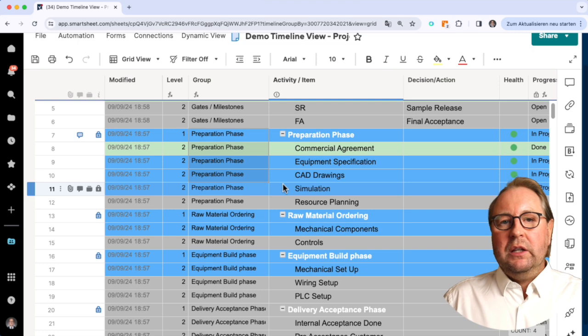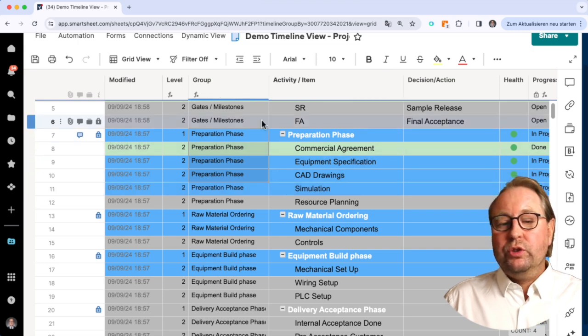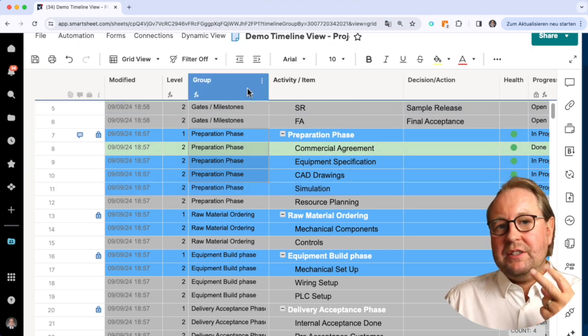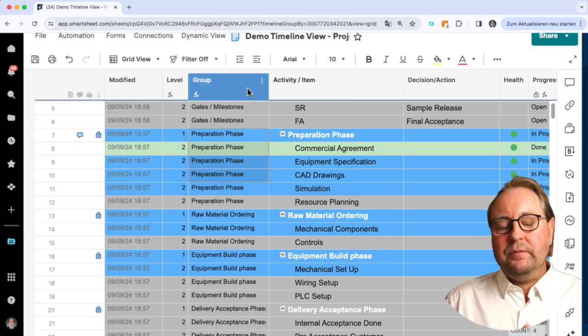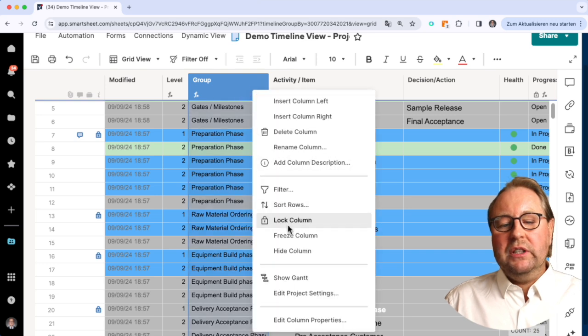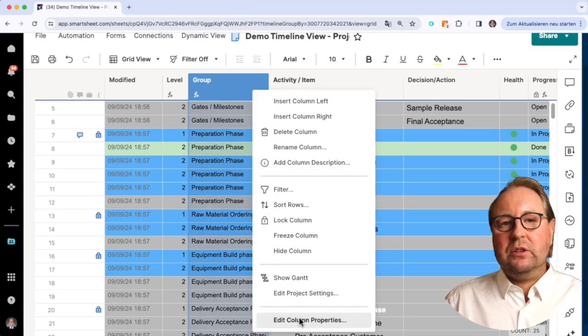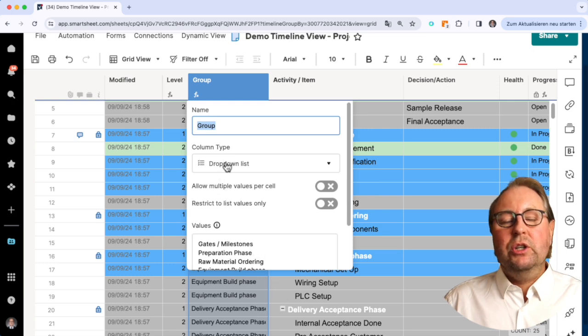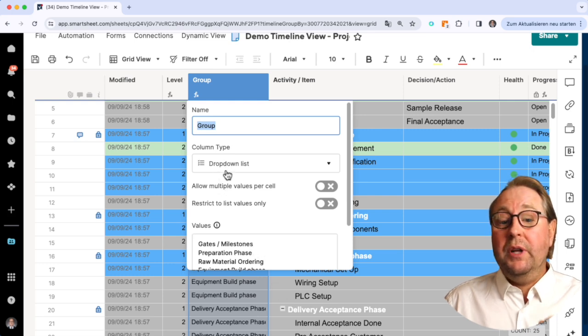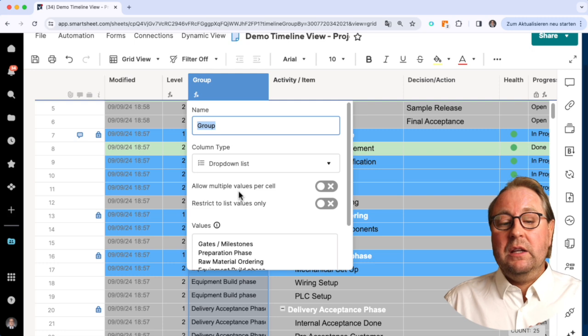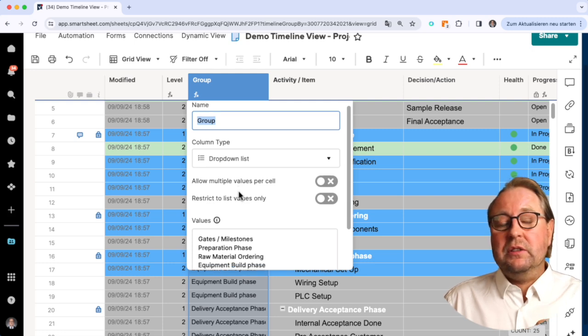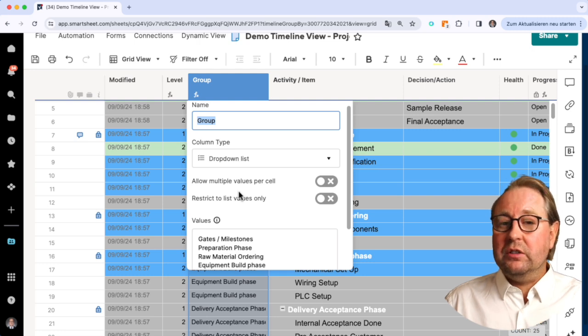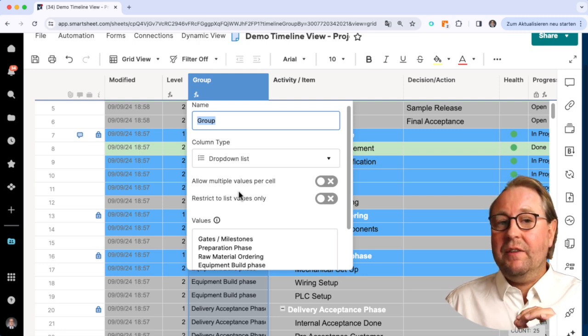In order to do so, we need a second step. We need here to change the column properties to a dropdown list. Just a dropdown list is possible to be sorted in the timeline view.